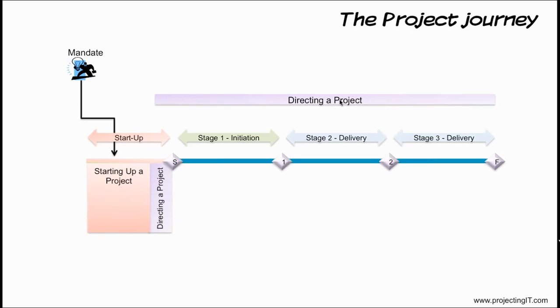They will commit resources to go into the initiation stage. The project manager also presents them with the plan for the next stage, in this case the initiation stage plan. Only after the board has approved can we move into initiation. At this time, the board may ask the project manager to proceed with initiation. They may ask the project manager to do some more investigation if more data is required to decide whether to go into initiation, or the project board may ask to stop and not to start initiation.